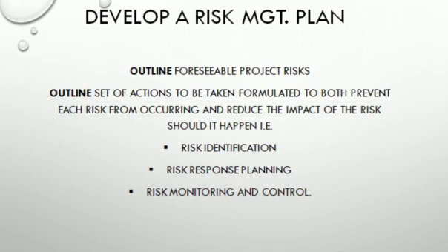Now, having put this plan in place, how do you ensure that the plan is actually doing what you desire of it? For instance, if you put a tarpaulin there and you leave it, the rain falls when you are not there, and as you come back the next day you find out that the tarpaulin was leaking, and therefore everything that you expected to be protected has been destroyed. You understand? But if, after putting that tarpaulin, you monitor it to ensure that it serves the purpose, maybe in the course of monitoring you will find out that there is a leakage in that tarpaulin, then you replace it.